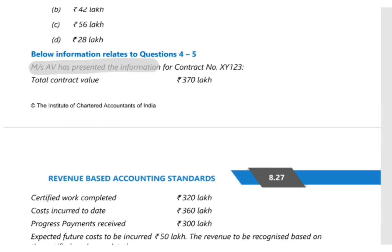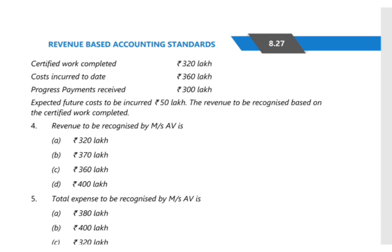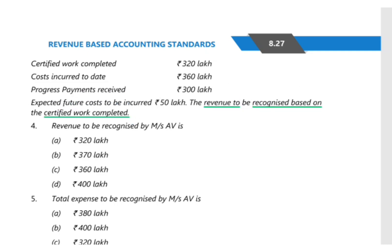We are given that Mrs. AV has presented the information for contract XY123. The total contract value is 370 lakh, certified work completed is 320 lakh, and cost incurred to date is 360 lakh. Progress payment received is 300 lakh. Revenue is to be recognized based on certified work completed, so revenue to be recognized is 320 lakh — option A.